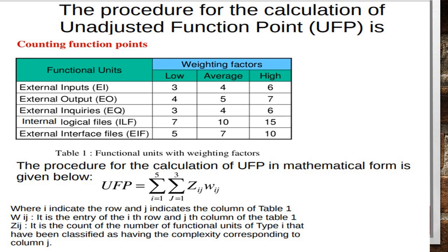It means that if for designing the functional units of external input the weighting factor is low, that means the function point of external input building is very easy, so the weighting factor can be a low value like 3.